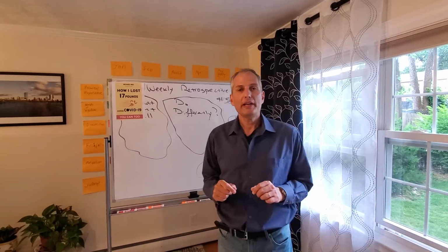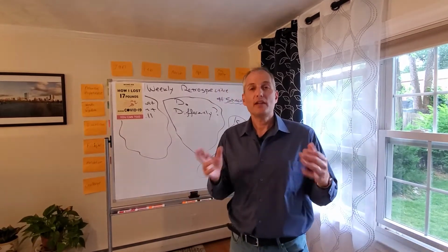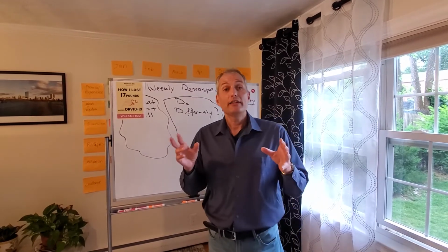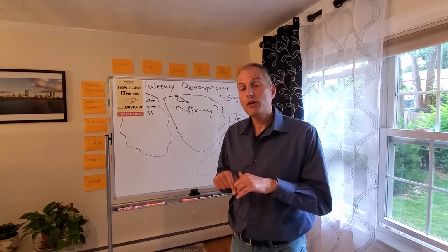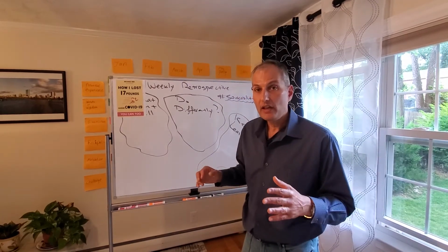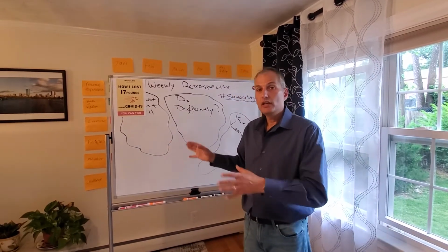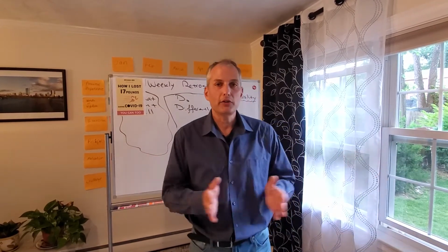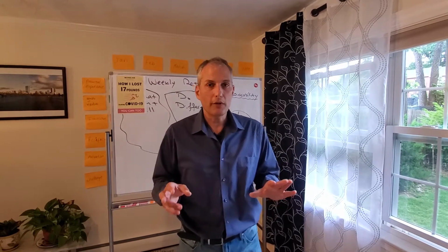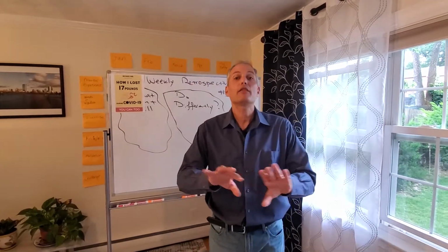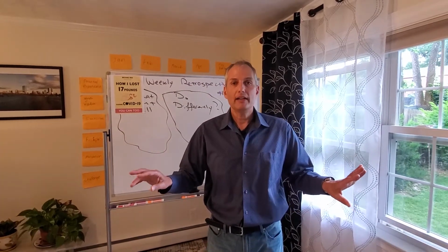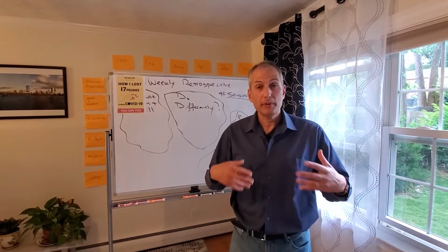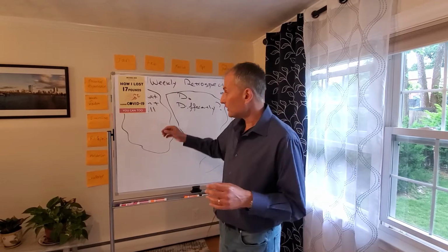Today, about retrospectives. If you remember, in December of 2019, before all this COVID-19 started, I talked about retrospectives. This time I want to talk about a remote retrospective that has a facilitator in front of a board, where everybody else is on Zoom or in a WebEx or any other virtual tool. Now, the first thing, if you remember from last time, have everyone open their mics and unmute. And we're looking at a team of about 6 to 8 that are speaking, and it's a 20-minute exercise.